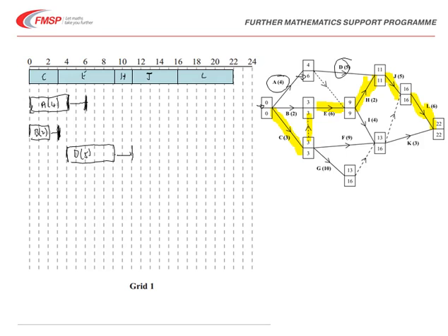And we just keep working in a similar way. F could start at time 3. It has duration of 9, so that would get us up to 12, just marking that in. And it has to be finished by time 16, so a float here of 4 this time.